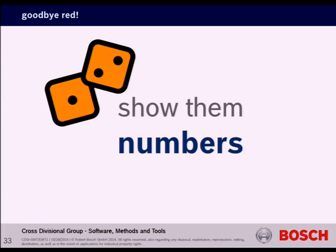And I'm sure most of the projects have some kind of a logging of the effort that goes into a project, what's the effort that goes into development, how much effort goes into testing or rework or bug fixing. You just need to put all these together, and you will be surprised to see in such a situation how much effort is going into all this rework and bug fixing rather than on the development activities that you should actually be doing. And that was enough for us to convince our managers.